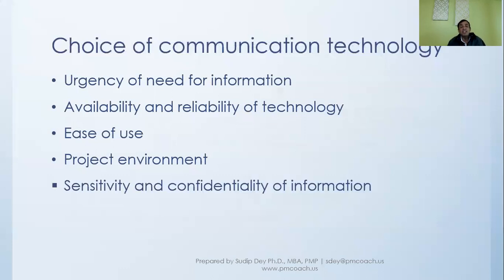And then finally, sensitivity and confidentiality of information. Many times, the information that we are passing along can be confidential. And if it is confidential, then we probably have to take extra steps. When we are sending an email to a client with confidential information, we will have to ensure that we are encrypting what we are sending, and also that the client is able to easily decrypt it at their end.